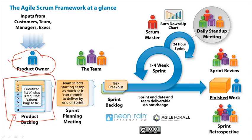The product backlog is a combination of different user stories. All requirements in user story form will be prioritized — one, two, three, four, five, six, and so on. The highest-priority user story is developed and delivered to the client first. For example, if students are arriving next month for registration, the first priority would be the registration module and payment gateway so that students can complete registration and payment.